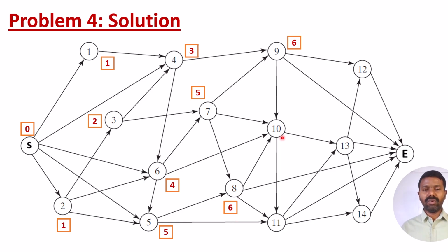And then now we will go to the next path, let us go to this 11th node. So here 6 plus 1, 7, and here 5 plus 1, 6. So the 7 will be maximum here, and even if you go this way, it will be 7 only. So 6 plus 1, 7. Here maximum is 6 plus 1, 7. Here also 7. So now, sorry, if you come here, it will be 7. So if you come to this path, 7 plus 1, this will be 8. So here it will be 8.